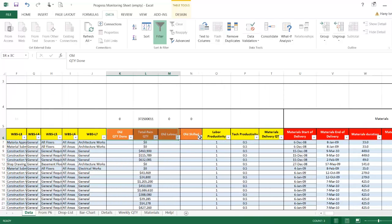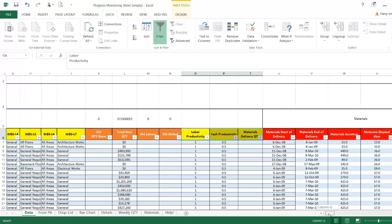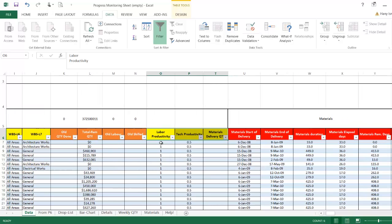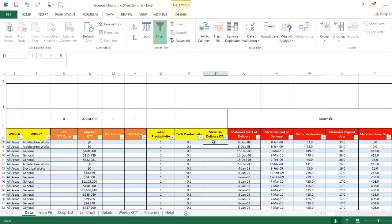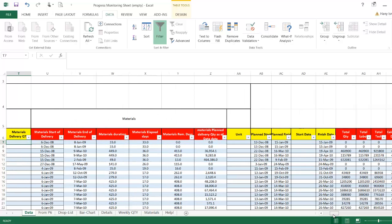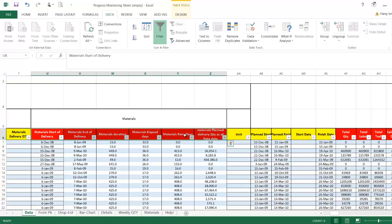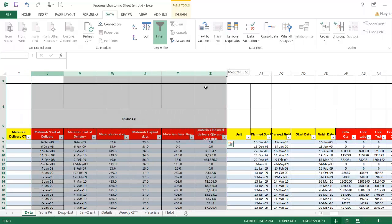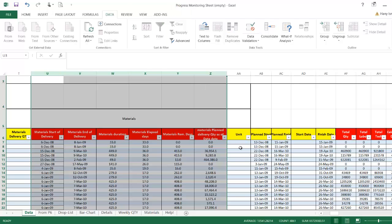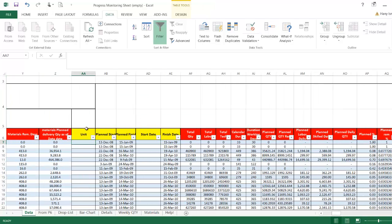The second section is the orange section — this will be used to make a recovery schedule, which I'll explain later. The third section needs to be filled with standard productivity rates for labor and for technicians. If you want to use the material sheet, type the total quantity delivered as of the data date. Important: do not change anything in the red-marked columns — they contain automated formulas. To add a unit to your quantity, add it in the designated field.